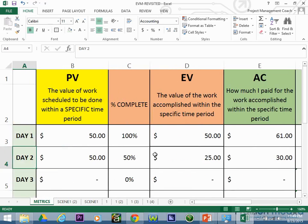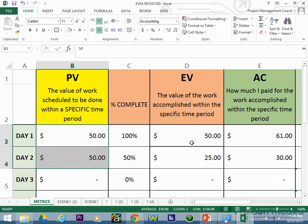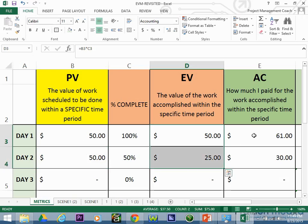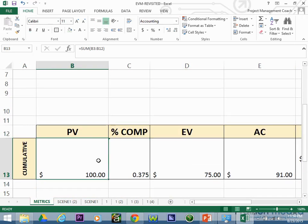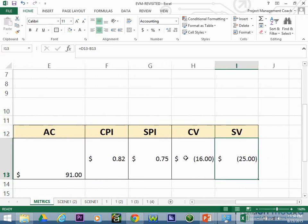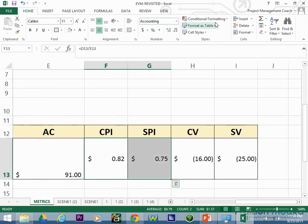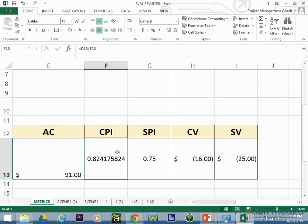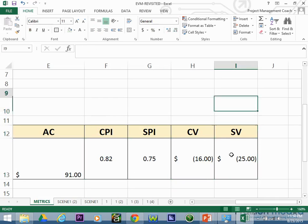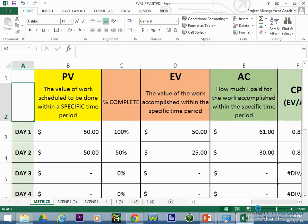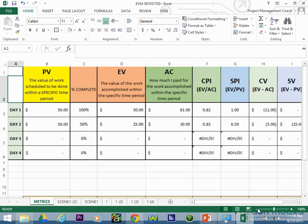You could also calculate plan value, earned value, and actual cost across the entire project at any point in time. At this point we have a cumulative plan value of one hundred dollars, and a project-wide percent complete of 0.375. Looking at the cumulative metrics, CPI and SPI are both poor — showing how well we're doing across the entire project so far.